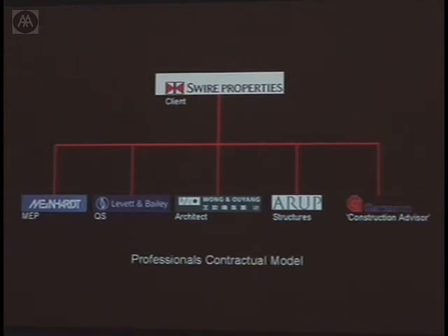And by that I mean that the client has very direct contracts with each one of these consultants. It's not like you hire the contractor and then you novate the consultants to him. He's actually hiring them all directly and getting them all to toe the party line directly. And they said, well, what's the best way of working? They have been working now for a number of years trying to get people to collaborate. So what they did is they rented an office in this Taiku place, and everybody sat in there. They've been sitting in there now for basically a year already.